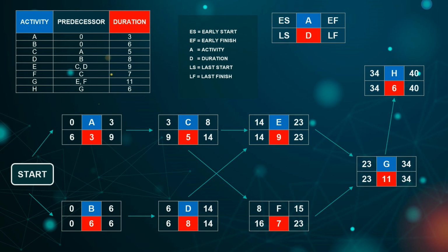From the CPM diagram, we can identify the critical line by looking at the EF and LF of each activity. Activities B, D, E, G, and H are critical because if we delay any one of these activities even one day, it will increase the entire project by 1 day. We cannot proceed with activity A, C, and F since these activities have slacks.